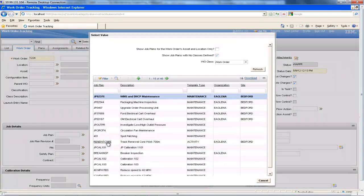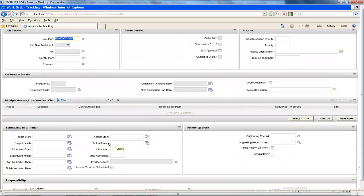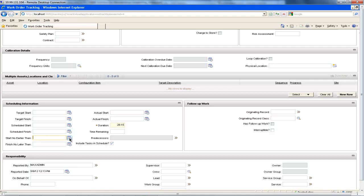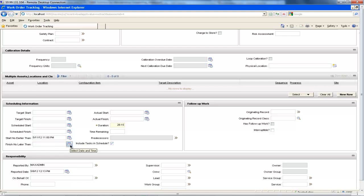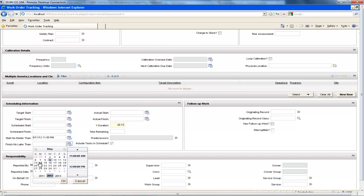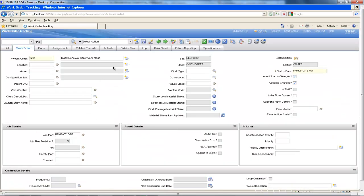Once we have selected this job plan, we will then select the available time window to perform this job plan by choosing the start no earlier than and finish no later than times. In this example, we would like to get the work completed over the weekend to prevent disruption for commuters during the week. So we set the start no earlier than time as 11pm on Friday and the finish no later than time as 8am on Monday. We then click on the save icon to generate the work order.